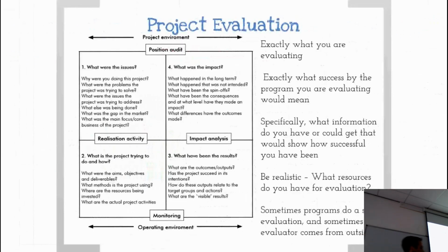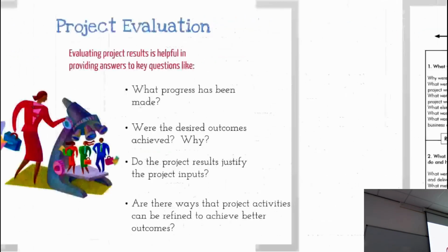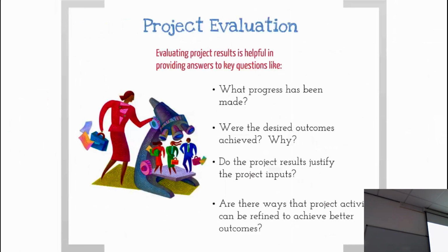When you say that we should learn and take benefit, should we then on the next one, for example, right across the board, acknowledge our faults and our learnings so everybody can see it? Absolutely. You should build into your project plan the evaluation stage post project, and then prior to the new project, build in time to sit down and evaluate what you've done on the last project in the way you built it. They can see that we're looking at changes here, which you might not have been before. Yeah, absolutely. I would say yes.